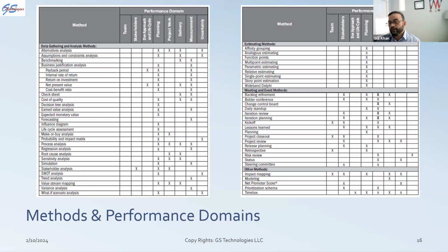Okay. The ground up is very accurate, but that requires a lot of knowledge about the project. If you have clarity in your requirements, timelines and resources, and you know exactly how much time each of those requirements is going to take, then you start estimating from a ground up approach.